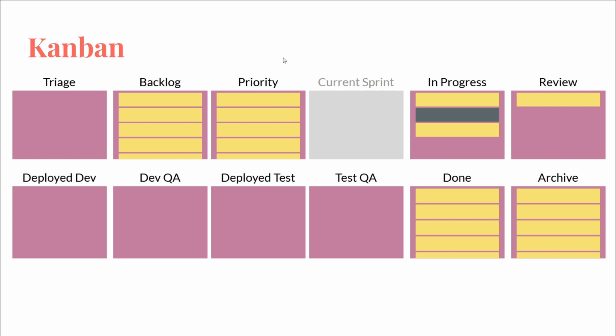Yeah, Kanban is really good if you're doing something like exception tasks where your job is to solve problems that other people come to you with, and you don't know what problems they're going to come to you with, how many you're going to get at a given time. So, if you work in an IT department and your job is to fix the computers and the systems, the issues people have, the IT problems, then people make tickets, and you need to prioritize the highest priority tickets and to pull those in.